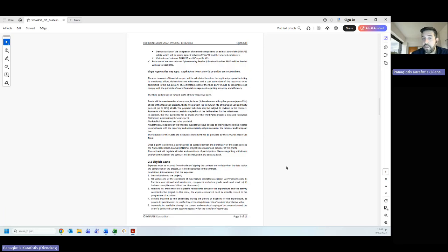So regarding the funding, this will be in a lump sum with 3 installments. 35% of this will be at month 3, the other 35% in month 6, and the final 30% at month 9. Let me also highlight here that, as we will see in a couple of minutes, the project duration will be 9 months. So we have divided these 9 months into 3 periods. I'm also going to present the eligible costs and the budget template.